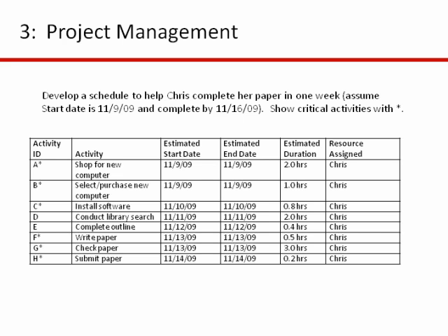Okay. So once you have your paths identified and how long it takes to get each one, then what you can do is you can put together a schedule. Now, let me come back here. Well, I don't have my network drawn here, but for instance, activity B. If you recall, we could do activity B only after we finished activity A. So if we finish activity A on 11/9, let's say in the morning, then we can start activity B on 11/9 in the afternoon. Okay.